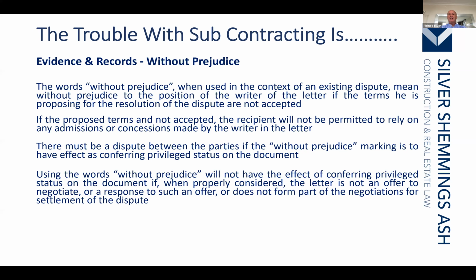So wherever you send a letter without prejudice and it does not refer to negotiations, it is not without prejudice, notwithstanding its heading. But equally, if I say to you, I offered to pay you £5 on a without prejudice basis, and you come back and say, well, I'll accept £7, but you don't state without prejudice, the fact that you are referring to the previous offer I made, which was without prejudice, your letter remains privileged as well, because it is a whole list of correspondence, all starting from the without prejudice communication. And therefore, it's continuing along that line.